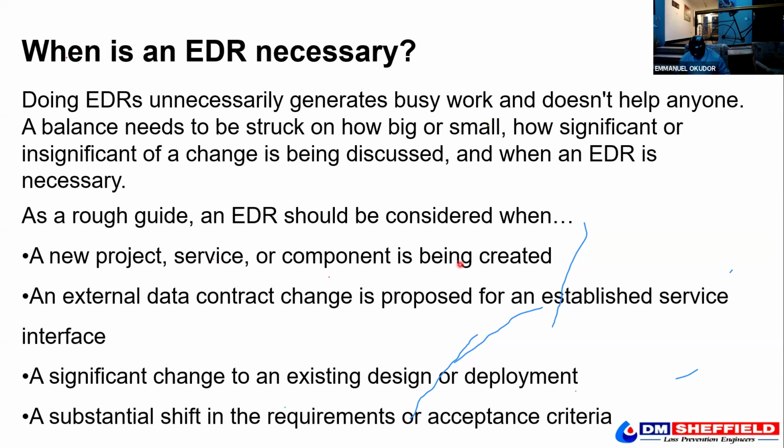Then, when an external data contract change is proposed, in a nutshell, MOC is very important. When there are significant changes during the project phase, before you get to pre-startup, pre-commissioning, and commissioning of that plant, it is important we review. It's a significant change to existing design and deployment, right?